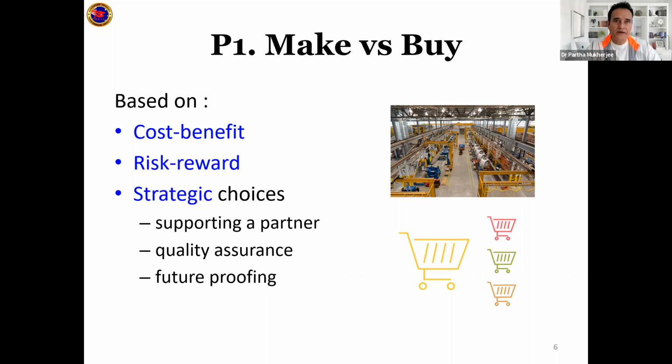You have specific partners who deliver the Carl Zeiss lens, specific partners who deliver very high quality batteries, specific partners who deliver high-end chips, someone who's giving you the glass or the cover. Now, you might decide to support those partners because that's the reason they are in alliance or strategic alliance with you. So these are called strategic partnerships. So you will use make versus buy also based on your obligation to your strategic partners.